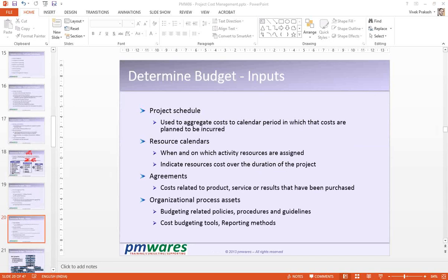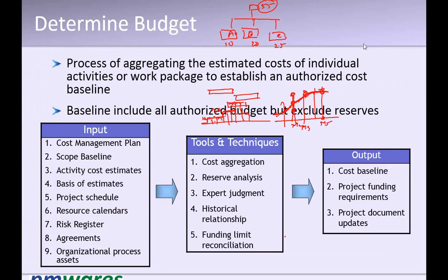Okay, so time phased cost is budget. So this S curve which comes out is basically your budget. Without expense plan, you either have an estimated cost or you can call it an allocation.